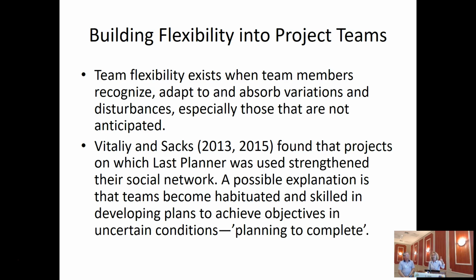Through constraint analysis, we may identify alternative solutions in light of uncertainty, and also make a commitment to a solution approach. We also refer to the work of Italian Sachs, where the authors from the lean construction community emphasize that even incremental implementations of the Last Planner system improve the social network, hence the performance of project groups. So what we say here is that in order to move from reactive to proactive approaches in project planning, we need to create flexibility first in planning.